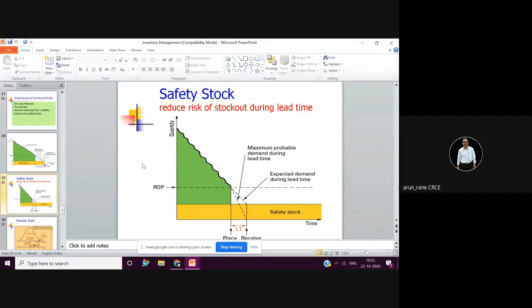You say that you are going to pay double, but please supply me. But no way. These are practical situations. In Gujarat, Diwali is extensive, so for 10 days it is closed. All the foundry people, machinery people, all the workshops are closed. If you want something, you will not get it at that time. Even if you pay double or triple, no way that you will get it. So you have to anticipate beforehand that during these festive seasons, your lead time is going to be very high.